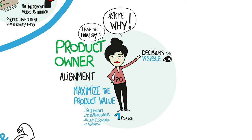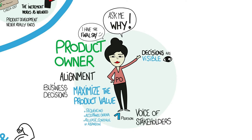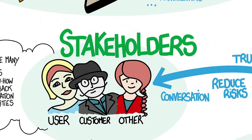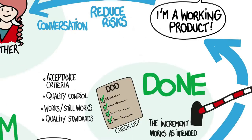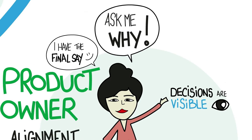Since each increment is really done, whether to release, continue, or abandon becomes a business decision. If the return on investment looks bad, the product owner is expected to pull the plug. The product owner is often called the voice of the customer or stakeholder. Her primary focus is not simply on staying within the budget, but on ensuring that the sponsor's money is well spent — by having good conversations with stakeholders and getting good answers to the why questions.